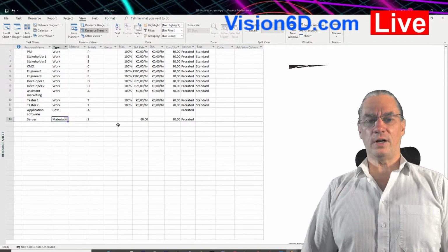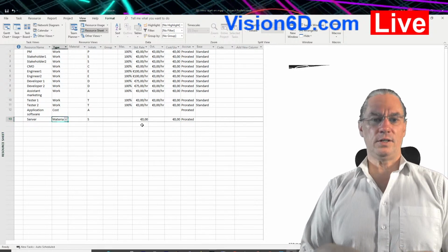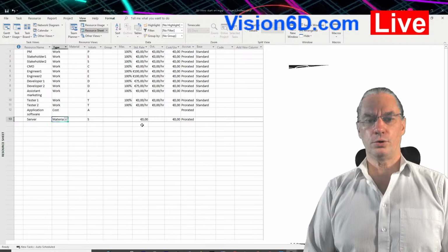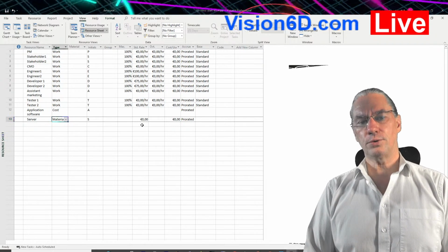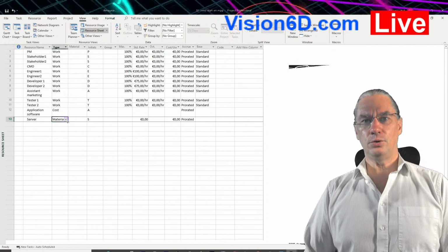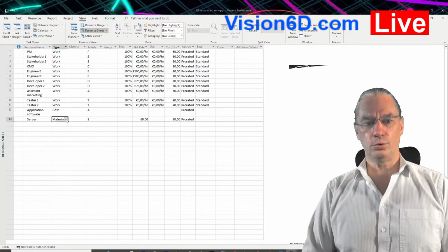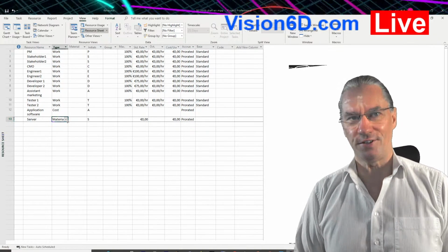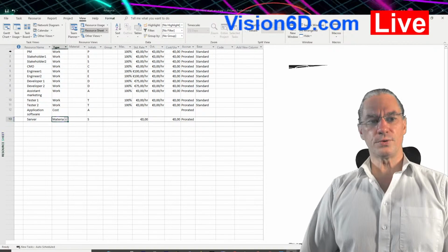And we would define a price per unit, meaning that if it's 100 or 200 euros per cubic meter and you need 5 cubic meters, you would say for material that the quantity you need is 5, meaning 5 cubic meters. Closing the parenthesis. So with that, we've defined those two resources.